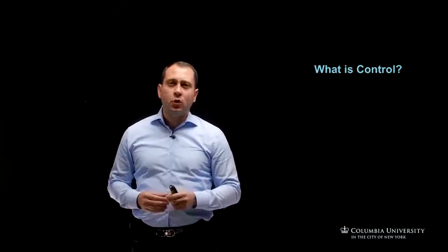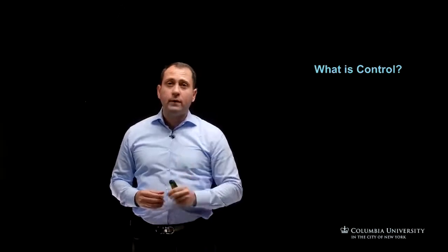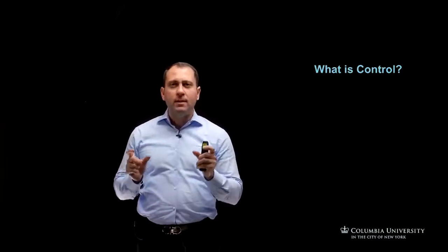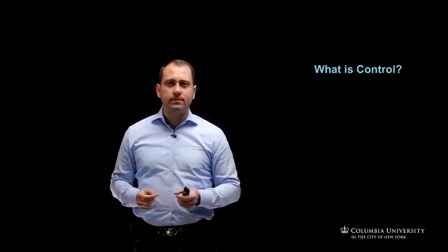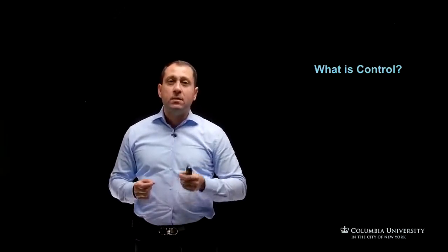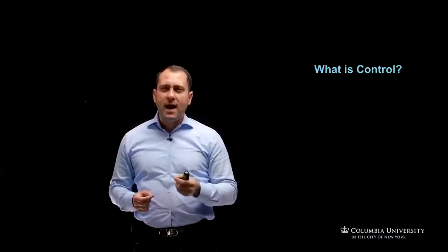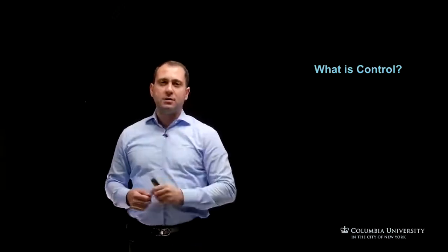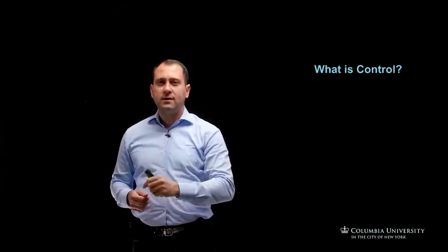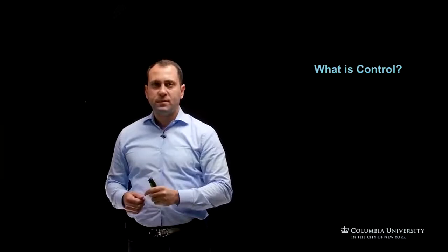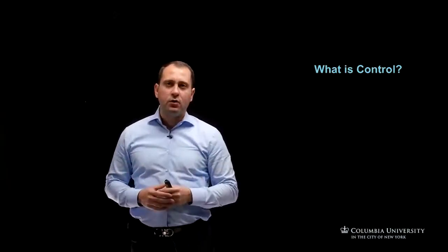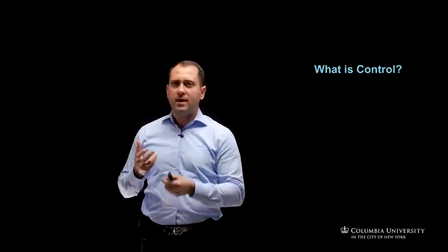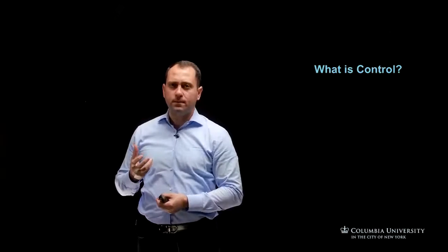I just want to highlight quickly before we move forward, as a rule of thumb, of course, the cost of implementing a control system or a cost control system must certainly be less than the cost of savings achieved by implementing that control system. So this is kind of a rule of thumb. You want to make sure what you're investing in, you're getting more rewards than the cost that you're paying in developing the control system for.